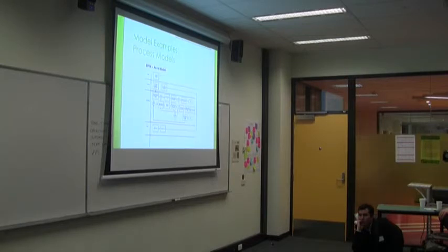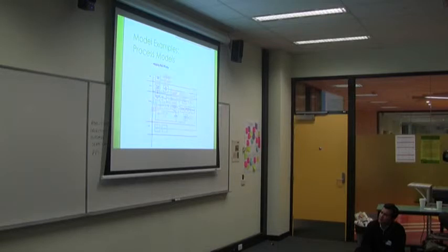So as a BA, and especially getting to a point where you've got your stories, doing an as-is to-be model. Now, don't worry about the detail, it just shows you processes and decision points. And even this, to me, is a bit too complex. I generally don't do swim lanes. I just put a model up with lines and boxes, and that's enough. That's better than nothing. It really at least gives you an understanding at a high level of your processes, and you can drill those down. These are really useful, especially if you want to get to the point where you've got your stories. Because a lot of these boxes will translate directly to an epic or a story, and then you can decompose those. And even a decision point might be a story, or it might at least provide information for different stories.